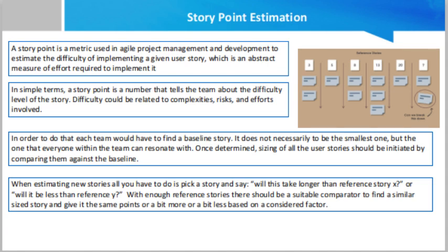Story points allow for consistency not just in teams but across departments. Determine a matrix. After you have decided to use the Fibonacci sequence, it's time to determine a baseline for each story point. For instance, you can use 1 equal to add a new product to a drop down menu, 2 equal to add order tracking for logged in users, 3 equal to add a rating system to the website, 5 equal to add a forum to the site, 8 equal to add GDPR and CCPA compliance across the site.